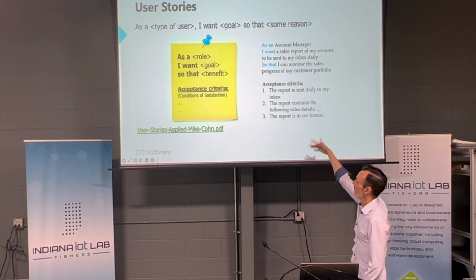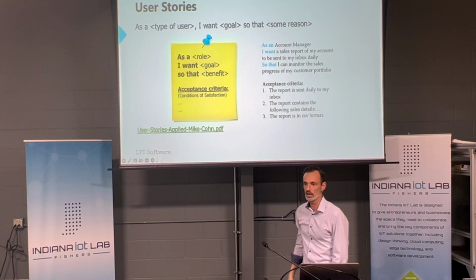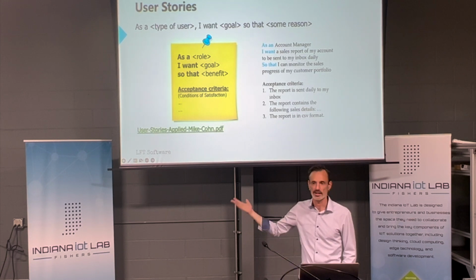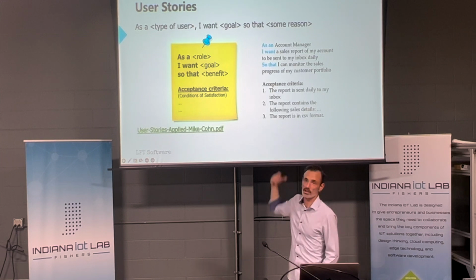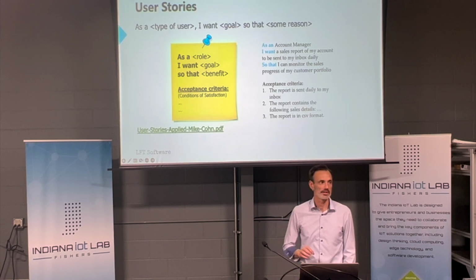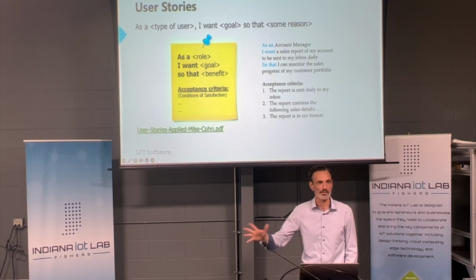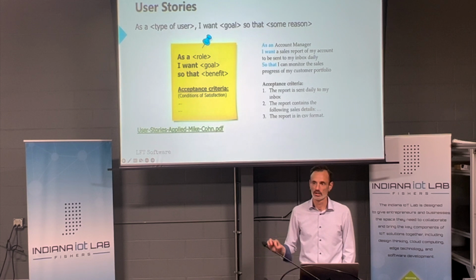And then when you write it, another good thing for testing is you simply have a tester, after the engineer or developer writes something, ask: what are the acceptance criteria? These are the tests to make sure that this story is how we expect it to be. I expect that I can enter a 256-character special message to my mother. I expect that once I hit send, she gets it at 8 a.m. on her birthday. The person thinking about this story for the user and who knows the why can write all those things out to make sure they get tested, and you really fulfill what that person wants to do.